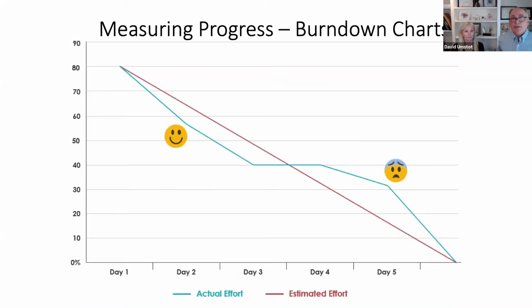So you heard us talking about burndown charts, okay? Typically sprints are shorter duration, as we said, 4 weeks or less. A month is probably a good planning horizon for most design teams. What are we going to do this month, working towards some type of interim design deliverable? And you'll end up with a certain number of points.